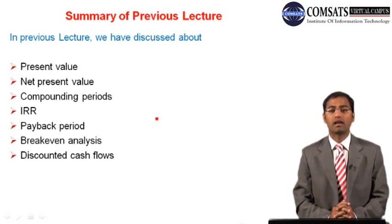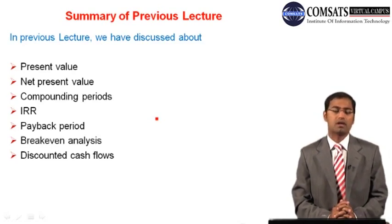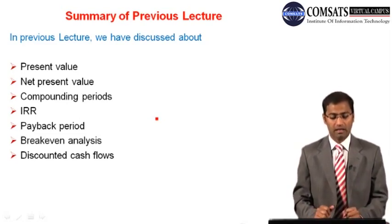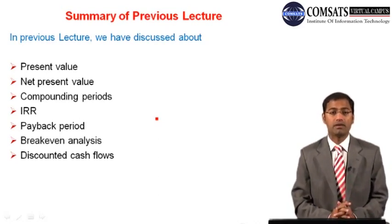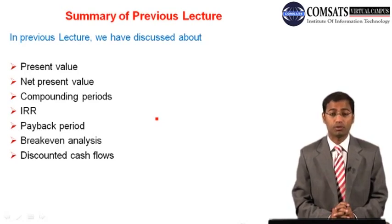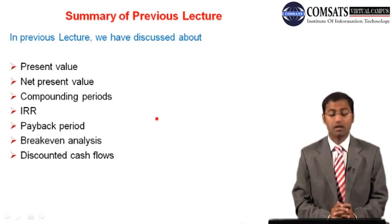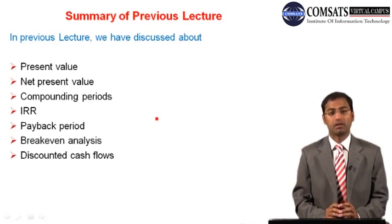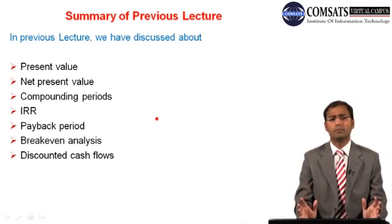We talked about the internal rate of return — the interest rate or discount rate at which we have zero net present value is the internal rate of return. The higher the internal rate of return, the more feasible the project is, and everything beyond the stated interest rate is good to take up. Then we discussed payback period — both simple and discounted methodologies — and break-even analysis, and discounted cash flows for project selection.